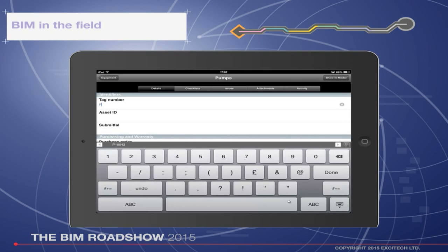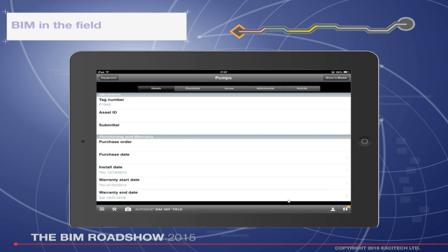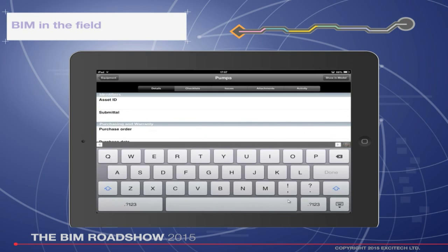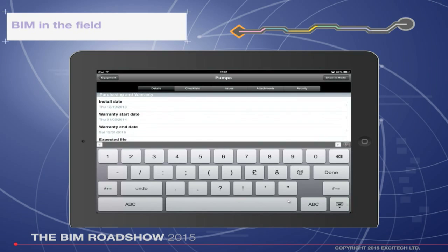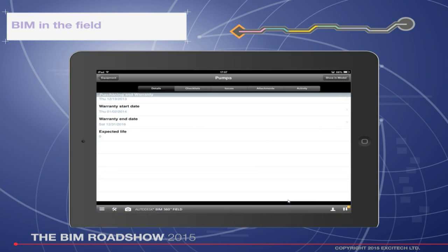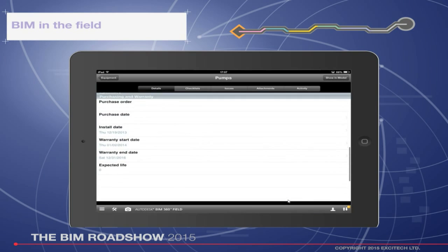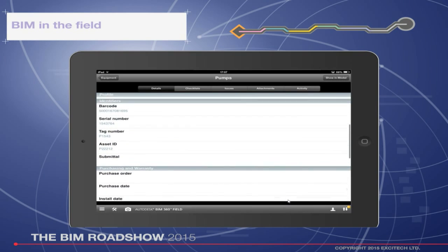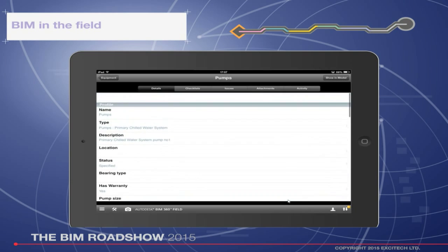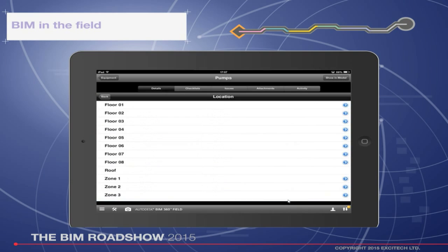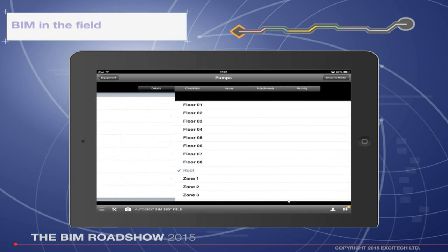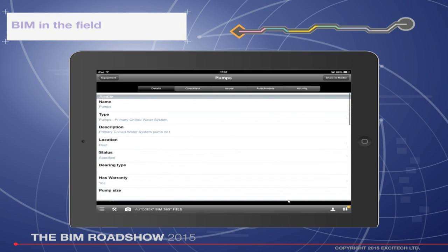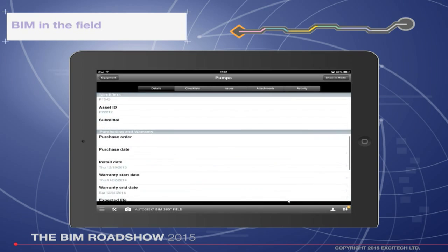Not what's in the high level of Revit or wherever. This is commissioning data. This is about your warranties, your serial numbers, things that are normally only delivered to you on data sheets. That's not what we want; we want it linked to the asset, and this is how we're doing it. All this great information now has given me real confidence that I can fulfill these requirements that the client's pushed onto us to collate certain data that's just out of the norm.